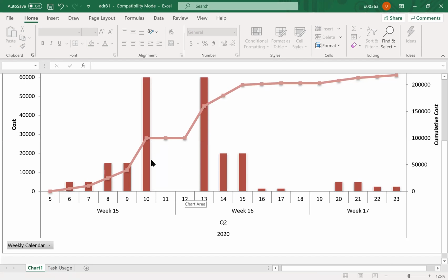Okay, so this is an example of the S-curve that we generate based on the values that we get. Basically, once you input the cost into your Microsoft Project, either directly using the fixed cost, or even the unit rate, then you can generate the S-curve.